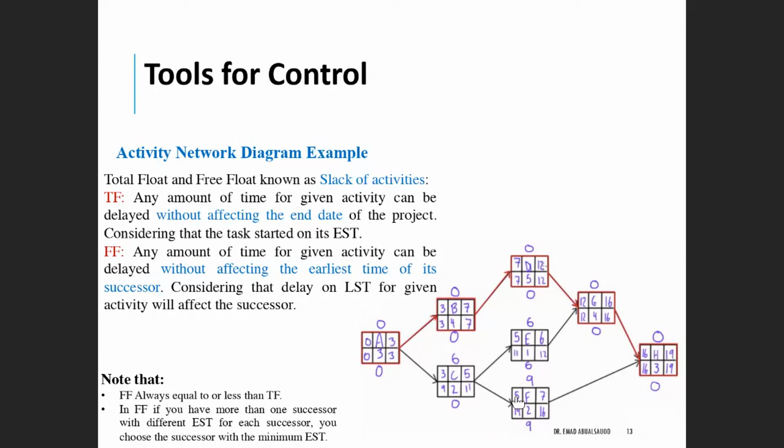However, this here will not affect the completion of the project, but here it will affect the total float. It will not affect the completion time of the project. But when you see this one, you have to consider it will affect the earliest time of the successors. Now, it depends on the successor. Does it have enough time to complete the task? Does it have enough resources to complete the task? Then you have to look up and watch this value here.